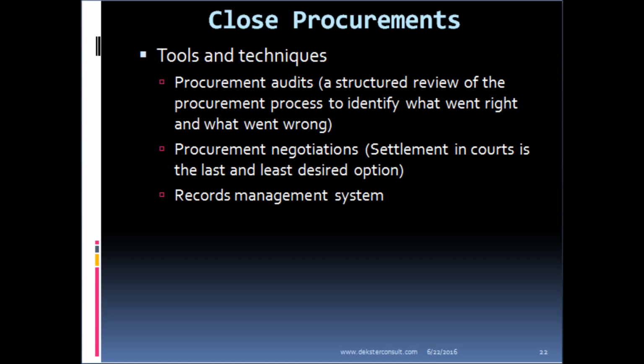Procurement audits, and these are a structured review of the procurement process. We want to identify what went right and what went wrong during the whole procurement process. That is why we'll undertake a procurement audit. We'll be doing procurement negotiations, and we should understand that settlement in court is the least desired option in handling procurements. We want to be able to mutually agree on issues rather than going to courts to settle issues. They will be handling a records management system.